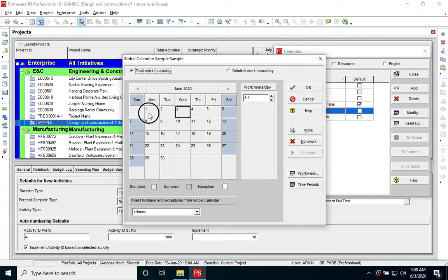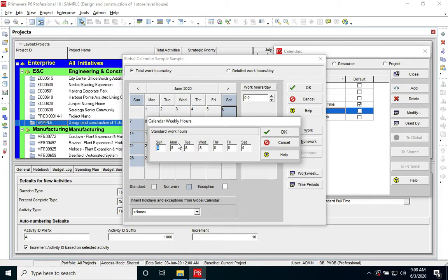At a basic level, I only care how many calendar days I'm going to spend on each activity. So that means that I will take Saturdays and Sundays as work week days. So we change the configuration of the day.